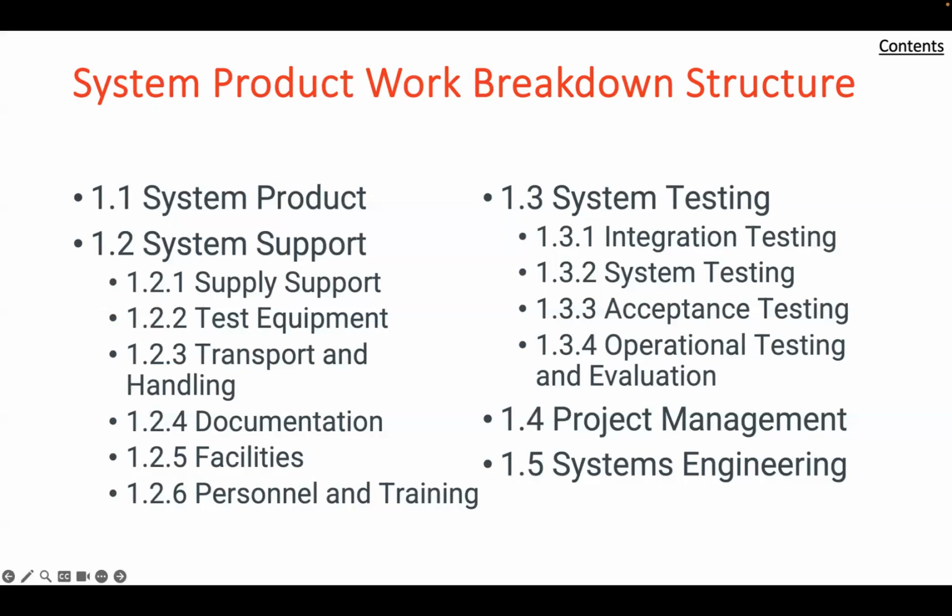Another key component for adequate cost estimating is the life cycle cost analysis. This approach is to determine and compare among alternatives in each development phase to acquire, develop, operate, and maintain all system elements for the most cost-effective options. Note that the least costly current element may not be a sound decision over the life of the system due to sustainment and replacement cost. Hence, the life cycle cost analysis is best conducted in the early planning and conceptual design phases of the project.